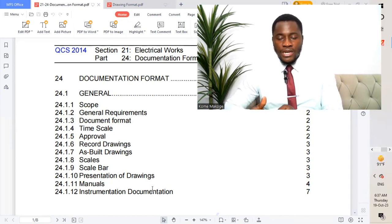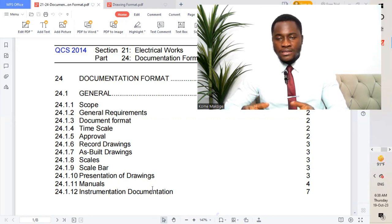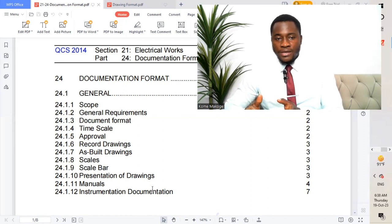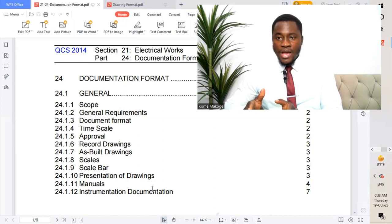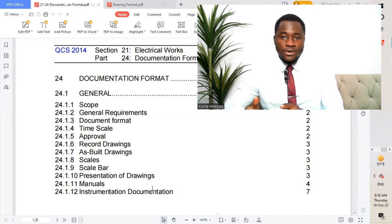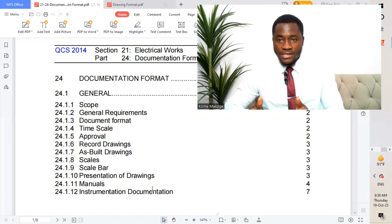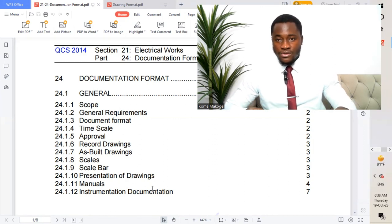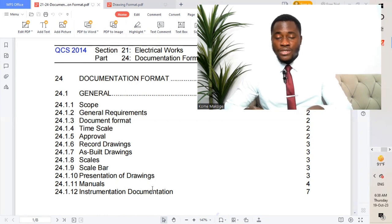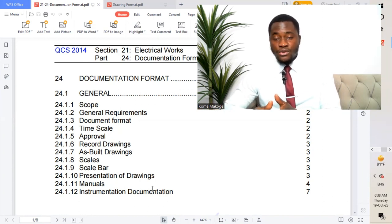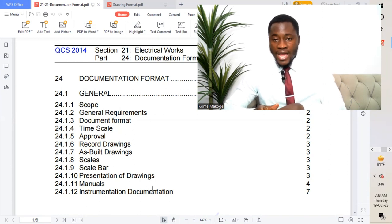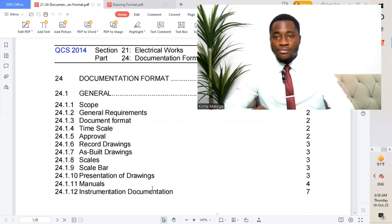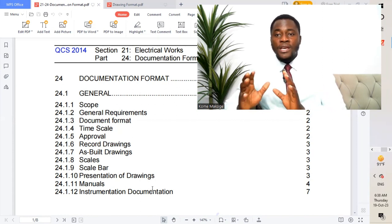We have different sets of drawings that will leave from the contractor. Supposing we have a contract and a contractor receiving the contract from the client, the client will prepare a set of drawings called IFC — issued for construction. These IFC drawings are issued to the contractor once the contract is signed, alongside specifications mentioned in the contract clauses. The contractor then prepares another set of drawings called shop drawings.